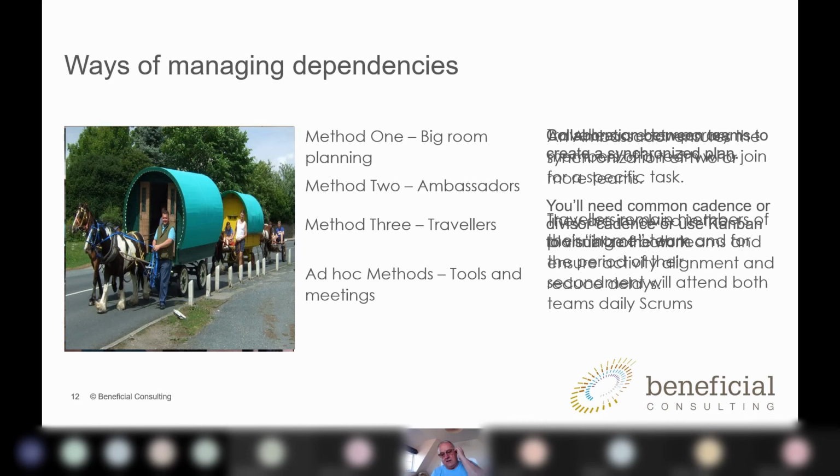The other thing you might need to think about is if you're using a SAFe environment. I've got some teams in my world at the moment that have a very stable backlog. The product is stable, and they're able to predict what they're likely to produce over the next quarter, because basically PI planning is what you can produce in the next quarter. So some people call it quarterly wave planning. But in my environment at the moment, the backlog is quite dynamic.